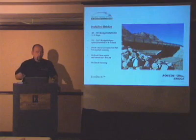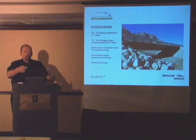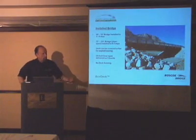If you were using a county crew that hadn't done it before, then you'd add another day. They take the video that we provide with the step-by-step instructions, and you can walk right through it and literally be driving across that bridge in 4 days from when you started to set it. On the 75 to 125 foot, it's a little bit more involved, because typically you're going to have a bolted splice in the center. It takes some larger crane capacity, and it's a little more involved system, although it's based off the same simplicities of the 40 to 50 foot bridges, and they'll be installed in 6 to 7 days.